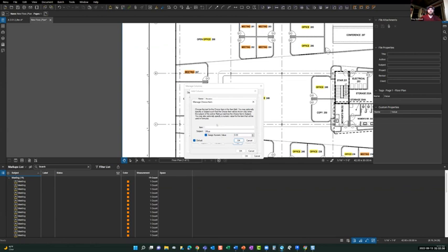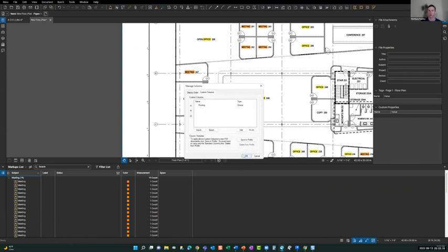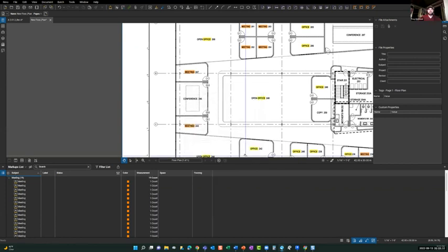So when I do a markup, it's going to default to a blank, which means I have to select a floor type. Otherwise, it's not going to give me my totals. And then I always put this at the top of my list. And I'm going to say okay. And okay. And now I've got my flooring column here.